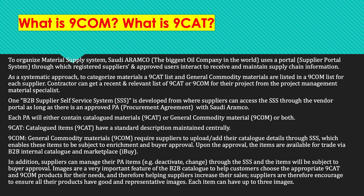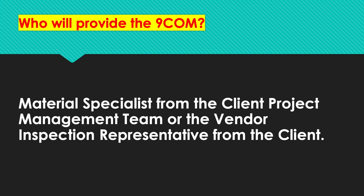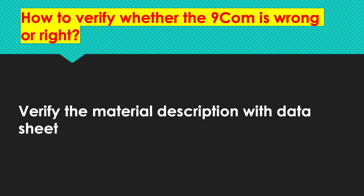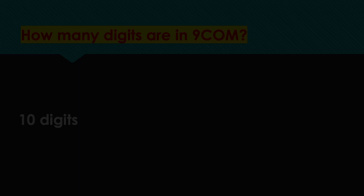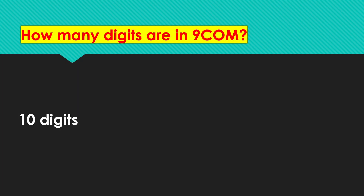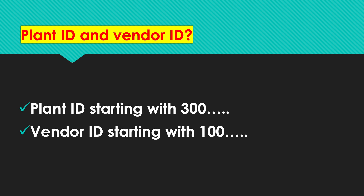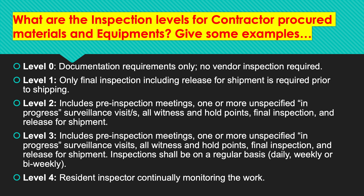Each item can have up to three images. Who will provide the 9COM? The material specialist from the client's project management team (PMT) or the vendor inspection representative from the client will provide the 9COM to the contractor. How to verify whether the 9COM is correct? Verify the material description with the data sheet. How many digits are there in a 9COM? Ten digits — plant ID and vendor ID. How do you identify the plant ID? It starts with 300; vendor ID starts with 100.